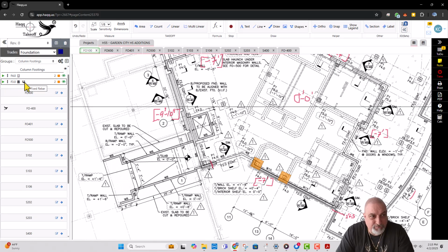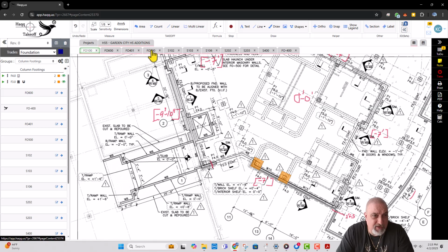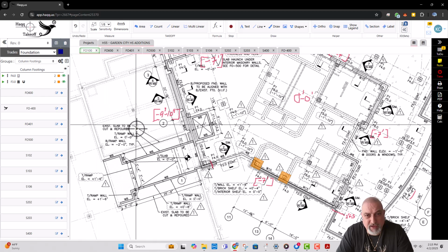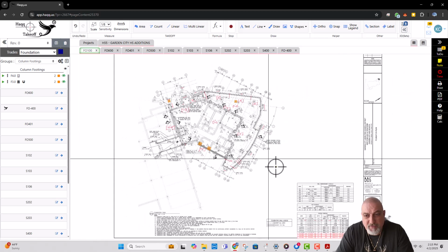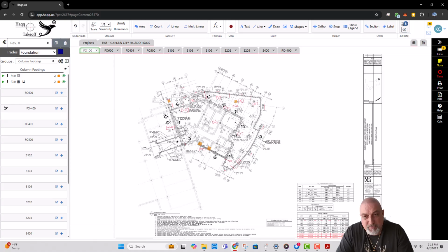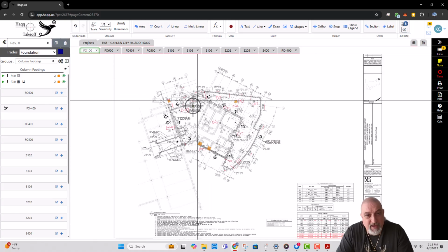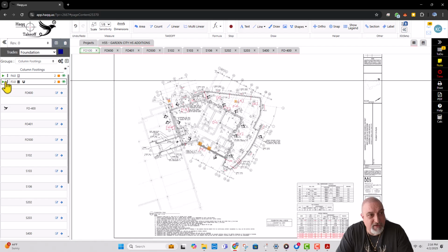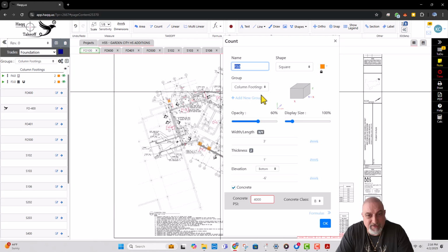This means when you copy this footing to another page, for example in a bigger building with partial plans, say part plan A and part plan B, and in part plan B there's another F3 footing, when you press play, it goes with the reinforcing inside because it has a magnet. It sticks to it.